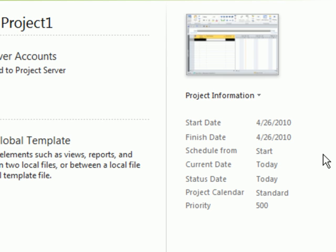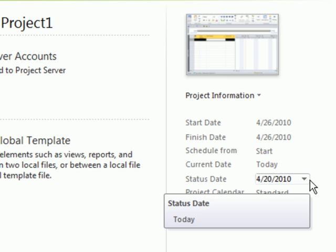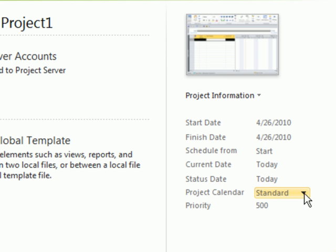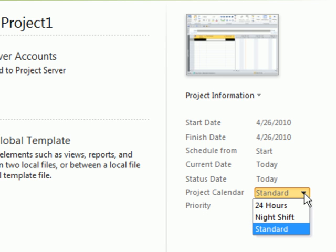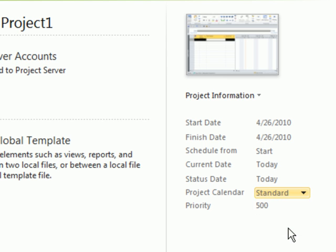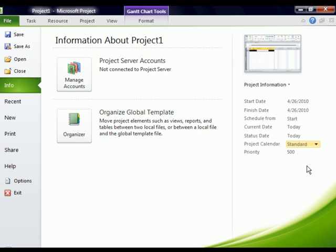You'll also notice that we've got status dates and current dates that you can change. And then it's asking you which of the calendar templates do you plan on using. It has a standard calendar which is currently selected, Monday through Friday 8 to 5 with a one hour lunch break. This can be adapted and we'll do so here in just a little bit. If your company is a 24-hour company, you can choose a 24-hour calendar. Or if there's a night shift calendar, you can set that up as well. We'll go into the calendar section and adjust holidays and non-working days in just a bit, but I'm going to leave it here on standard until I can create my own.